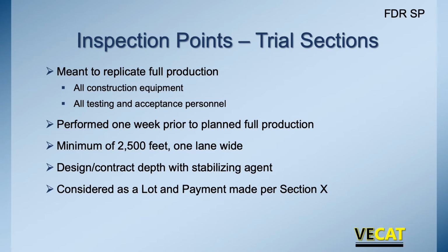Why do we do them? Before we go full bore on a project, we want to make sure we have all of our ducks in a row, we have everything lined up, we have all the equipment, all the testing and acceptance is there. If we can do a trial section properly, then we can get into full production and have a high confidence of success.